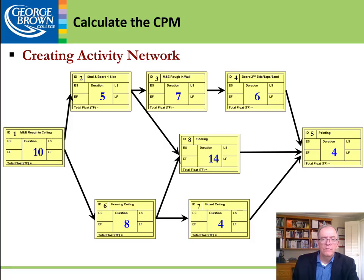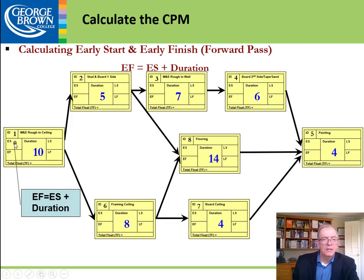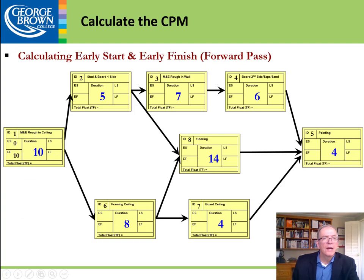Now, starting our project, you assume you're starting at zero — that's the early start date and the start of the project. We take our duration of 10 and add that to zero, giving us an early finish of 10. The early finish of M&E rough-in then becomes the early start of stud and board side.